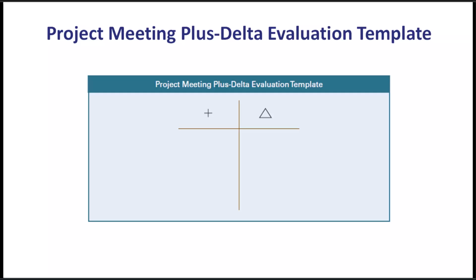Add any follow-ups from the Plus side, too. This brief evaluation becomes the final section of the minutes. Experienced teams can complete it in 1 to 2 minutes, yet the saved time compounds across projects. The approach mirrors agile retrospectives. Practical tip: keep the canvas visible so progress can be reviewed regularly at the start.